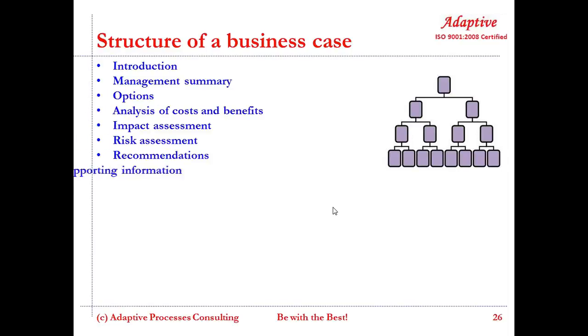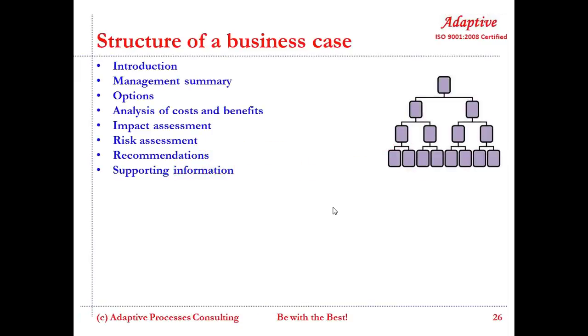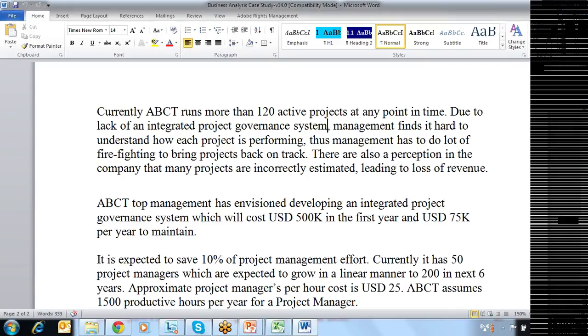There are different ways in which you can structure your business case. It could be introduction, management summary, options, analysis of costs and benefits, impact assessment, risk assessment, recommendation, and supporting information. In this, you guys have got the document, right? All of them.